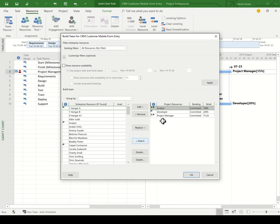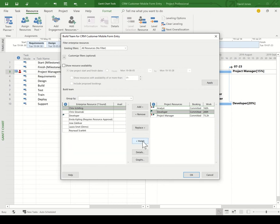Let's staff the developer resource to start with. So I'll select my developer, and I'm simply going to hit the match button here. What Project Online has done now is it's gone out and found everybody who has the developer skill.